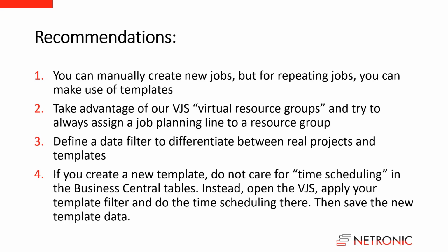So we have this placeholder for the meantime. You can give it to your whole resource group, and later on schedule it to a specific resource under that group. So that's the idea of the virtual resource group. I think it's easy because it takes your mind off of actually trying to think. When you create a new job, you're trying to think of who among my guys will make it, but actually it doesn't matter. We recommend that you use this functionality of the virtual resource group to just put it on the Gantt chart first, and later on plan it accordingly.